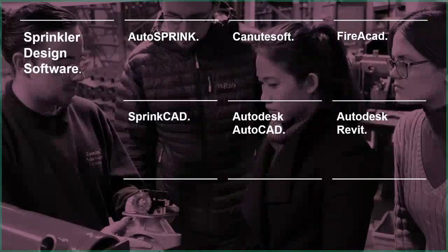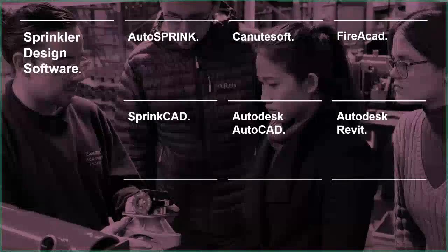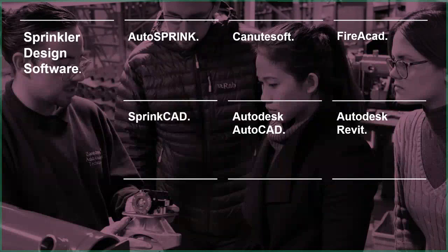Let's talk about sprinkler design software for a minute. So there are various packages on the market for designing sprinkler head layouts. In my brief time when I worked on the engineering side of Project Fire, when we were contractors, we used AutoCAD to plan out our pipes and our heads. That obviously created 2D drawings, which we could then submit normally to the M&E contractor. We would submit those drawings to them, and they would say, "Yeah, we're happy with that." We get them signed off, and then we can pass them on to the installers, who can then actually refer to those drawings and install the heads.